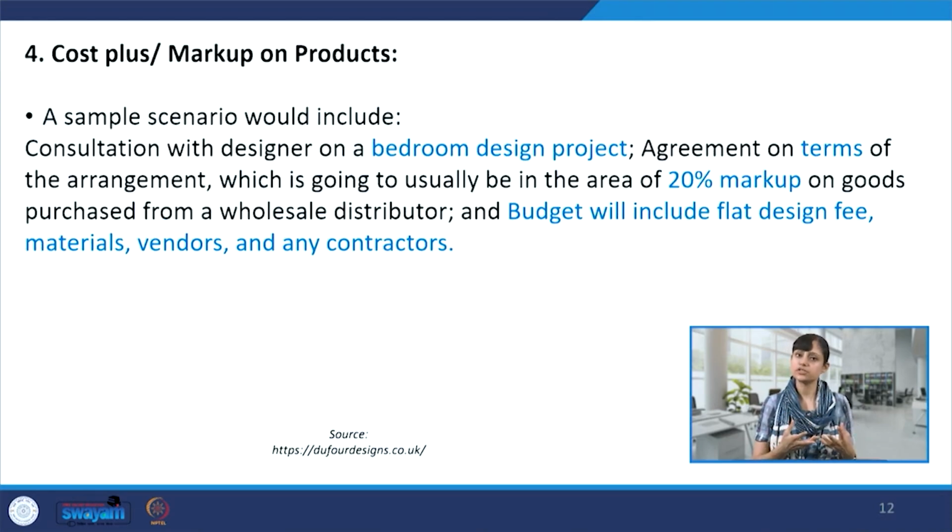If there is a consultation with the designer on a bedroom design project, there will basically be an agreement where the terms and conditions will be laid down, like what are the products to be procured for designing the bedroom, what are the kinds of furniture pieces, or what is the bed design. All of these products which are procured and curated, there will always be this agreement in place, and it could be like a 20% markup on goods purchased from a wholesale distributor. So these kinds of costing methods are also employed while working on small projects like a bedroom design project.